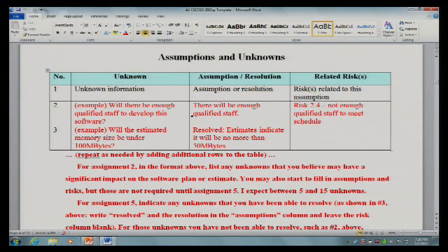As you work on assignments 3 and 4 and 5, you will resolve a lot of the unknowns, and in the cases where you can't resolve them, you will put in assumptions. Generally speaking, when you have an assumption, you end up with a risk. You may also have a risk if you think you've resolved an unknown, but your resolution may be incorrect.